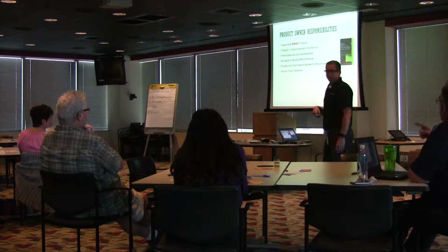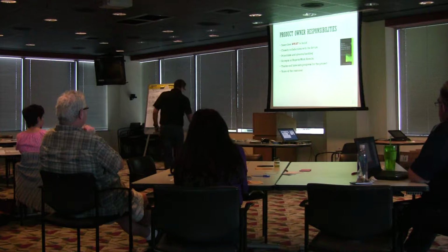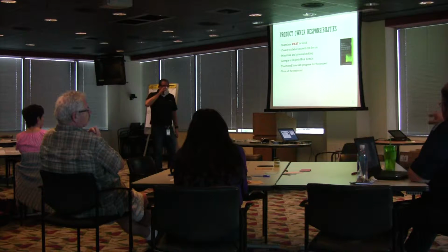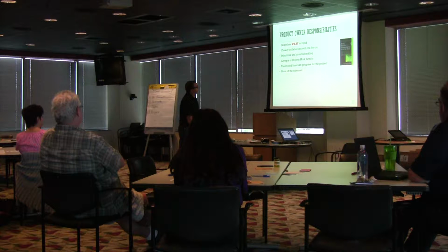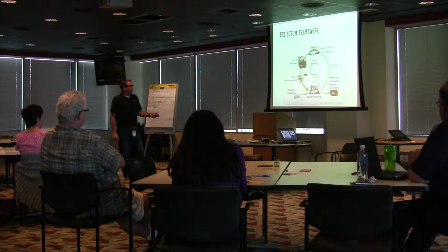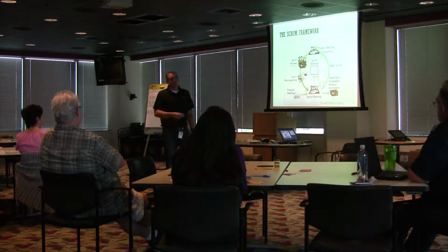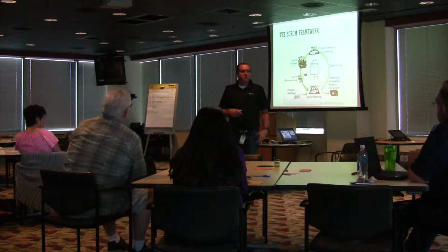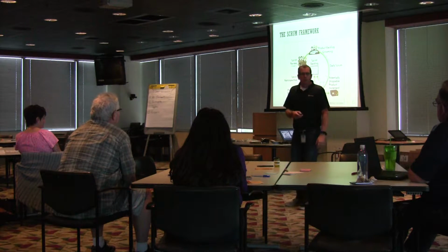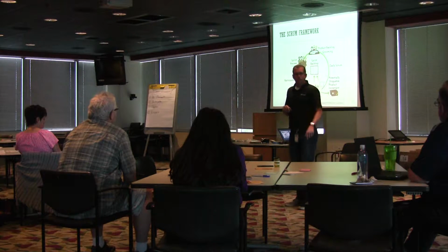Just had a question about that. So when you had your example of your product owner that came to your team and said, hey, I have this great idea, let's do this, when in that circle on the earlier slide does that happen? When does the product owner come to the Scrum team and say, hey, I need to work on this item? In this particular incident, it was sprint planning, which was way too late, in my opinion. Where that should occur is in backlog refinement, coming up with ideas, having that discussion. Because if you're having that detailed of a discussion at sprint planning, I'm okay with a one-off or two-off type of thing, but it really should occur in that refinement. But every now and again it happens at sprint planning.